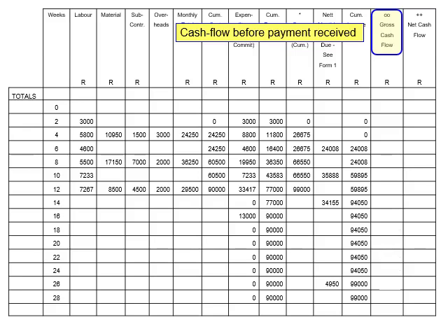Go to the cumulative income due column and select the amount in the period before week 2, or week 0. You will find the amount is 0. Then go to the cumulative expenditure column in week 2. You will find the amount is 3,000 Rand. Now, deduct 3,000 Rand from 0. The result is minus 3,000 Rand. Record the minus 3,000 Rand under the gross cash flow column for week 2.